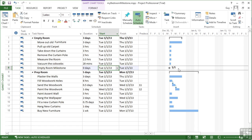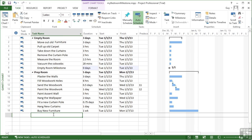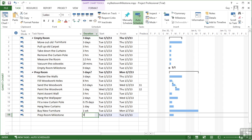It only shows the month and the year. Similarly, I don't need to insert for the last task in the system — 'prep room milestone,' again zero in the duration, which gives me another little black diamond in the Gantt chart with the date: January 1st. The reason the milestones are here and not at the end of each section is because they're not linked together yet. Once they start getting linked, the milestones will effectively become the last point of that section.